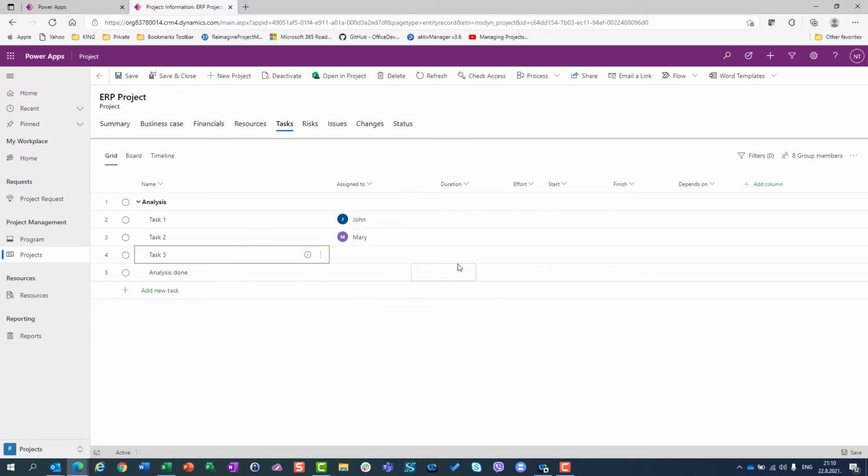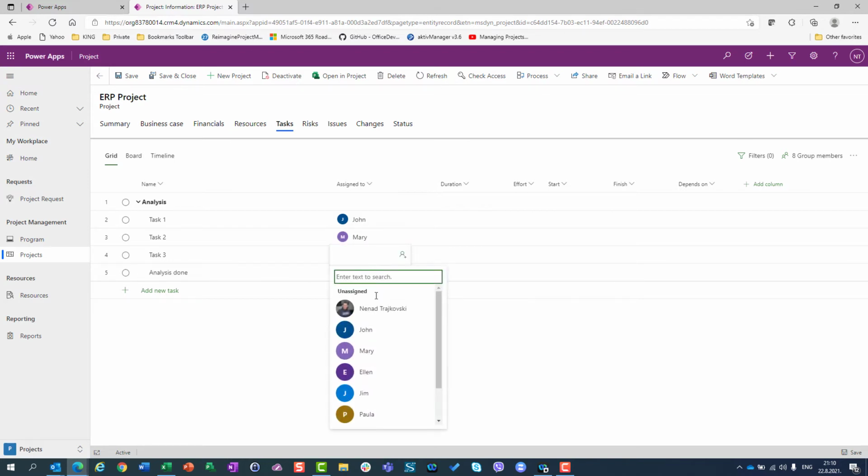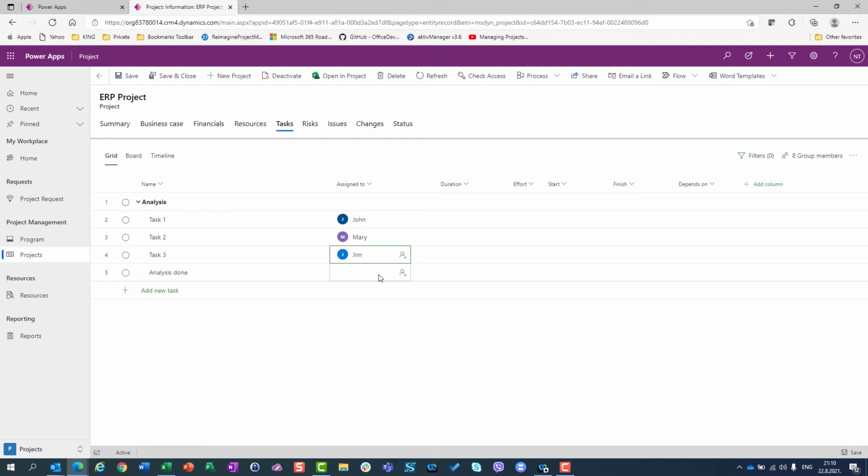Okay. Task 3 is assigned to, let's say, Jim. And task analysis done is assigned to no one, because it will be a milestone. Let's go to the effort. I will say John needs 40 hours. Calculation is done. 40 hours.